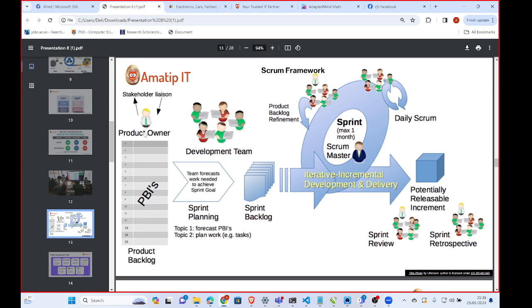Once we have all the lists, the team will review the list and prioritize how important each of those backlog items are. And once we prioritize them, we then group them into development phases. Development phases mean the duration we want to spend on each of those groups.